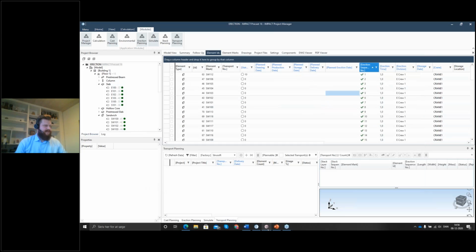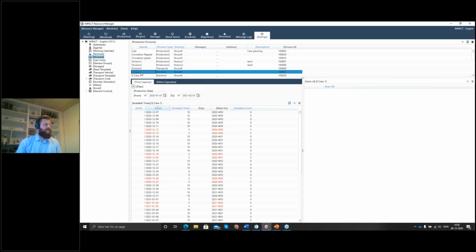But the times on the site, actually, I'll close the standard admin down so we can look at it here. I called my erection division erection crew 1. This is my way of doing it. It doesn't have to be specifically an erection crew, but that's the way I typically plan it. So you can have all of your erection crews, put them where they need to be, and so on. But if you take a look at this time capacity under my erection crew, you can see I have, starting from yesterday actually, 10 hours a day. And this is because yesterday I was in creating this for the webinar, of course. And then all the way up to the 1st of February. That's the time when I know when they're there.